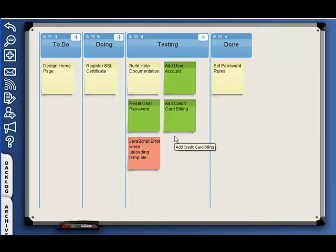These work and process limits prevent us from creating bottlenecks in our team and therefore keep the flow of work constant, making us more likely to complete our projects on time.